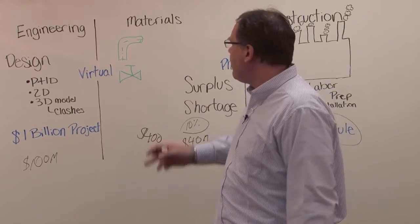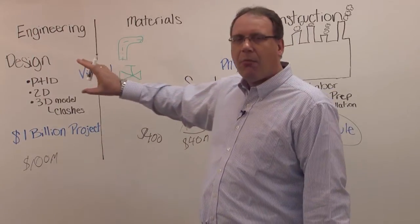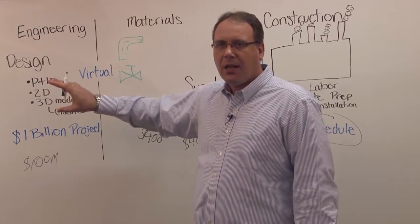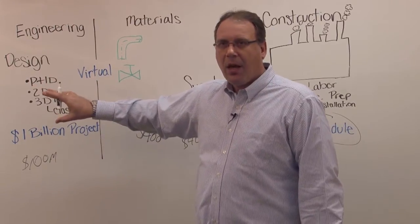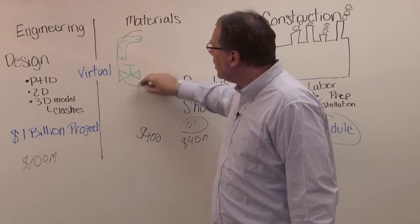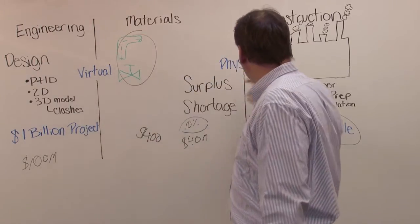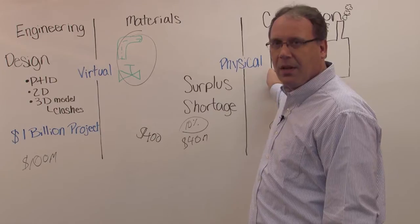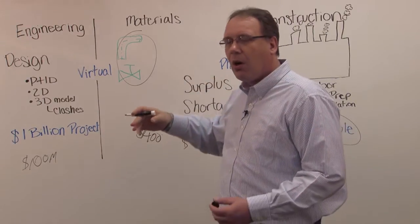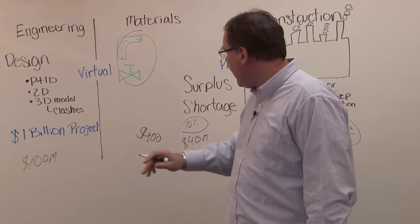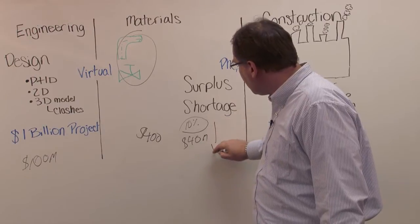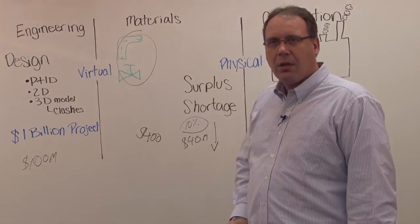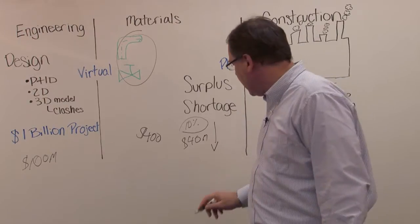What materials management does is basically comparing, always instantly, how much do I have in the model, how much have I bought, how much do I need tomorrow. And it's comparing this all the time. And then based on this, you know I need this now, you are able to reduce your surplus perhaps to 5%.